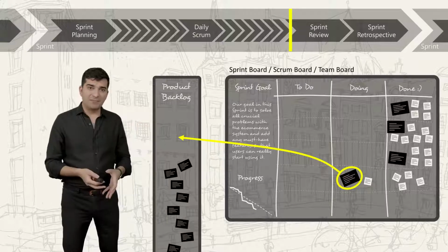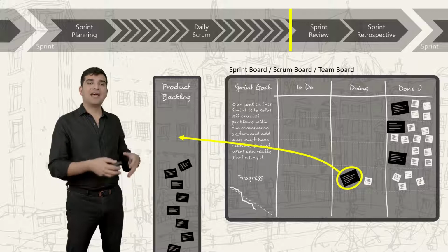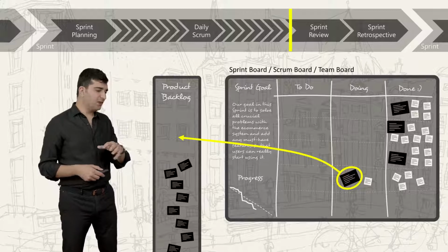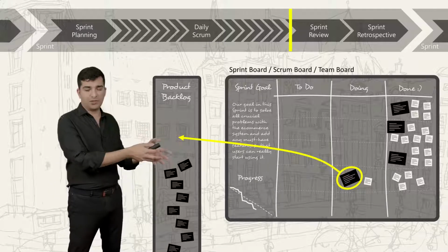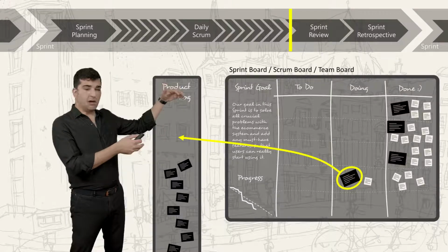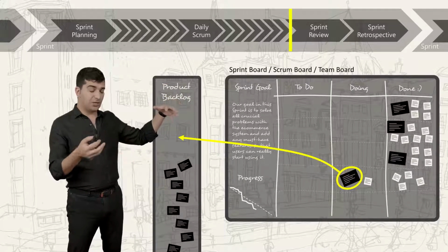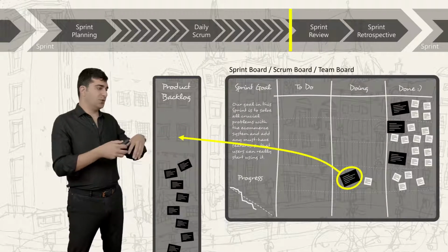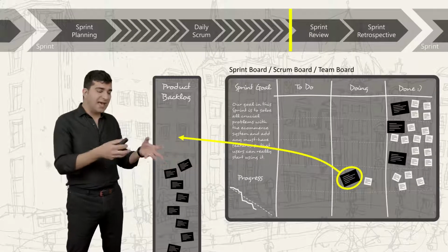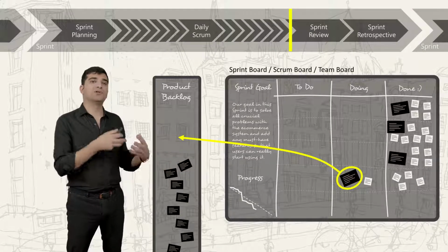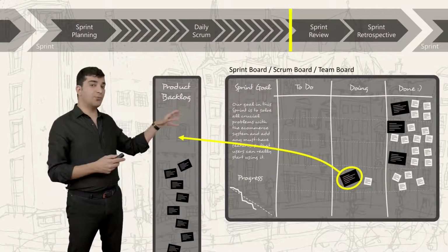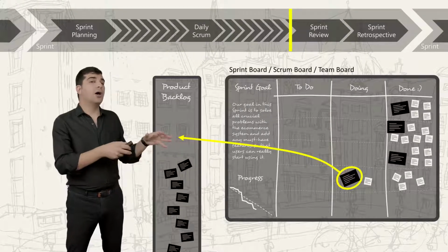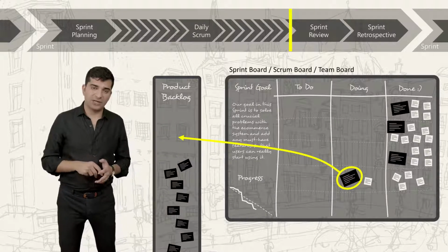We will refine the backlog again. We will order the backlog and then we will create the next sprint backlog the normal way. You know why? Because, for example, you may have started working on the feature and it was on the top of the product backlog because you, as a product owner, thought that it's a very simple feature. It takes only a few hours to develop and the return on that investment is justifiable. That's why it was on the top of your product backlog. But when people started working on that, they realized that, oh, it will take weeks to create that feature.